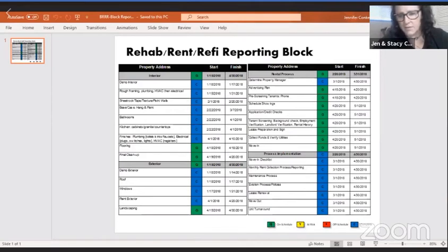And down here has the grid: green on schedule, yellow at risk, red is off schedule, and the blue C is completed. So anytime I was getting ready to get in front of one of my investors, I would die if I had any yellow or red on here. And because of that, it kept me highly engaged in the process to keep that contractor moving forward. So this is a pretty cool reporting structure in case you guys have any investors that you're working with.